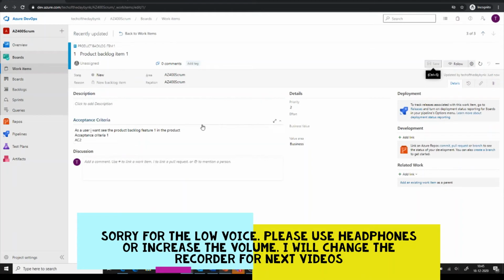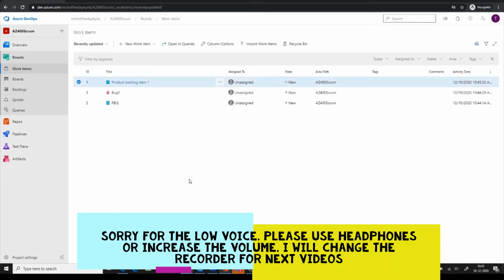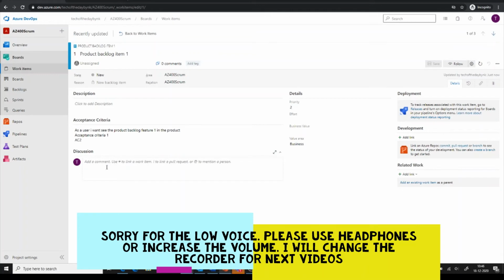And then once I'm done here, if you remember from the previous video, we talked about different events. So once I'm done with the product backlog items, I can call for the refinement. You can ask the development team to go and look at these items, if their definitions are clear, and if not, then I can provide more answers to their questions. So they can just go here and ask a question in the discussion.